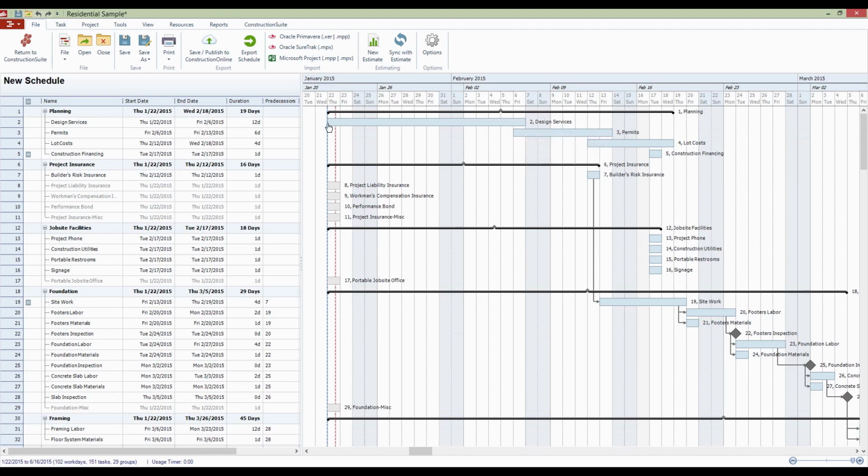So on this Gantt chart, of course, you can recognize that the 22nd is the first day for design services. There it is right there as well. This task should end on Friday, February 6th. There it is. And therefore, it spans 12 working days, which is where the duration comes into play as well. Now, if you count up the days on this, you might recognize that it's actually covering 16 days. But the calendar that I've got right now is set to ignore certain holidays, and in this case, we've also got it set to ignore weekends. No Saturdays and Sundays for my guys.